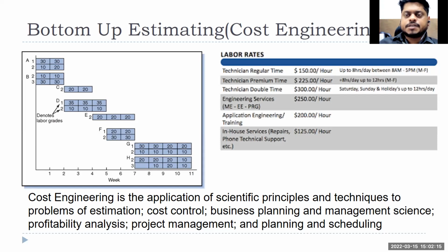I can be very rigid and say that no, this has to be completed within 1 month. So whether it is overtime or weekends, they have to work. Then I have to pay additional money, or I can do a little bit of engineering, a little bit of logical stepping. If I use my regular workers for overtime or weekend working, I'm going to pay them 1.5 times or 2 times their salary, which is more costly to me.